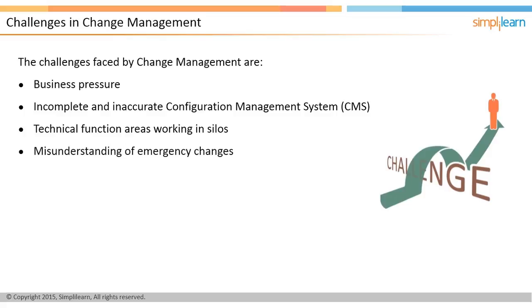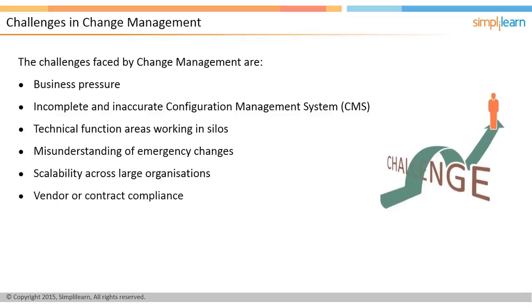Additional challenges include misunderstanding of emergency changes — sometimes the technical team may confuse the urgency of implementing a change with emergency changes. Scalability in a large organization is a challenge, as some CIs may not be deployable in the existing infrastructure. Finally, vendor or contract compliance can be a challenge when vendors have their own change management system and may resist adopting the business organization's process.